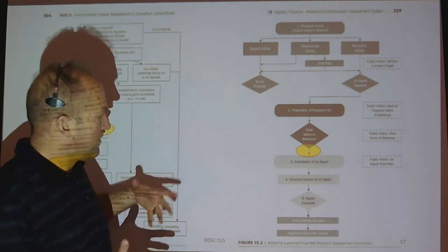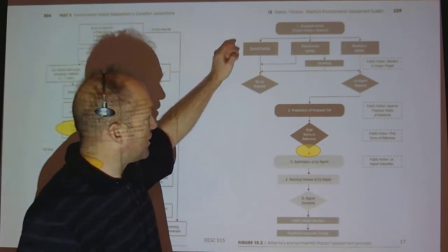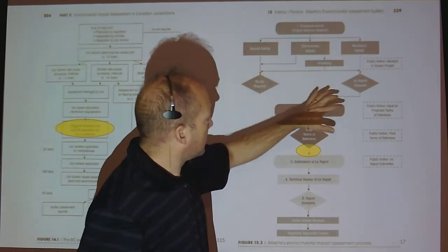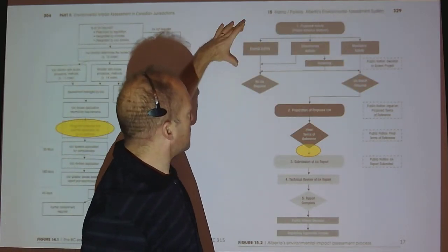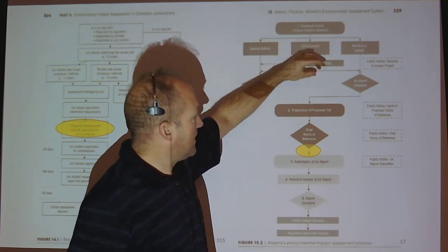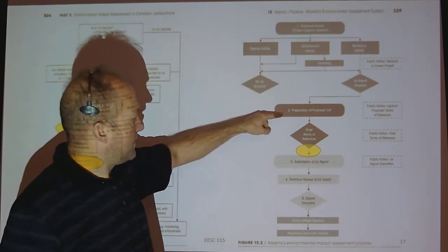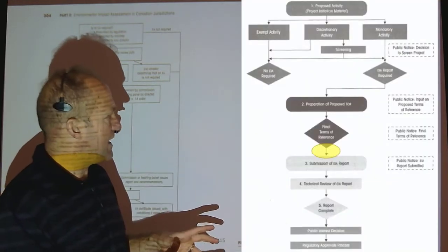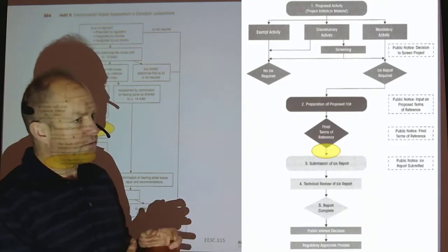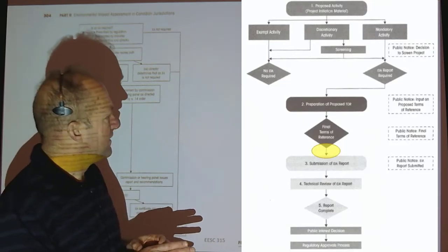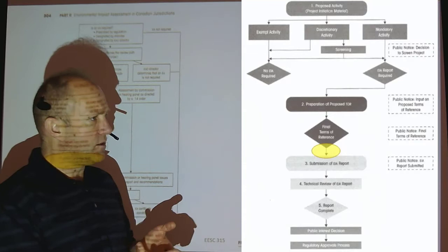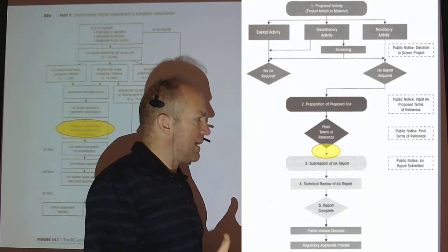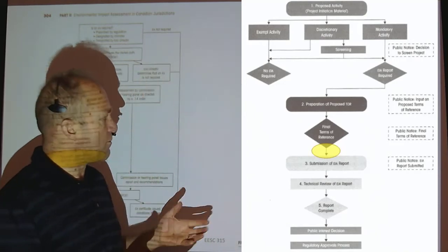Similarly, in the Alberta chapter in the same book, I found this a little bit amusing actually, that a lot of this focuses on the initial processes of screening and terms of reference preparation. So the government will look at the project and understand whether it needs an EA. Typically that's going to be yes for any sort of a major undertaking, like a mine, a pulp mill, major development in a park, anything that can have a significant adverse impact on the environment.